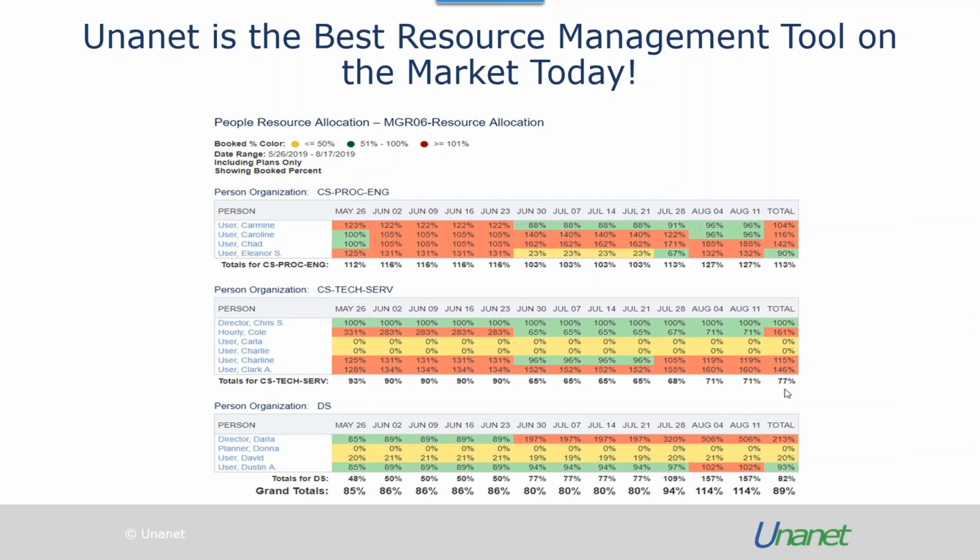What is the probability that you're going to win that project? You have that same ability then with projects that you're bidding, and to get that information in for those projects also, and then the projects that you're executing. So it is so powerful to really be able to see your annual operating plan, as well as your long-range plan, so maybe 3 to 5 years out, and then be able to model that plan and change that based on when the probability of win, probability of go, or however you're actually calculating that within the system itself, and be able to look at your total revenue forecast.